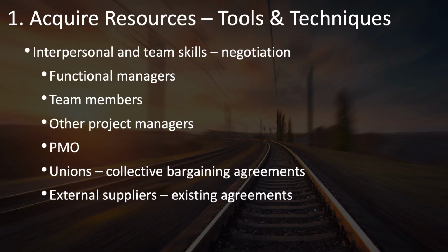On one project that I was planning for a large long-term project in Outer Mongolia, we discovered that we needed a document management expert to be on site for a while. I happened to have been working with and known some of the top experts in the organization in document management, and one of them was a friend of mine from back home. So I called him up, we talked about it, and he was open to the idea, but then we needed to escalate as well to my upper management and his upper management in order to arrange for him to be there for several months in order to help plan and implement this project.